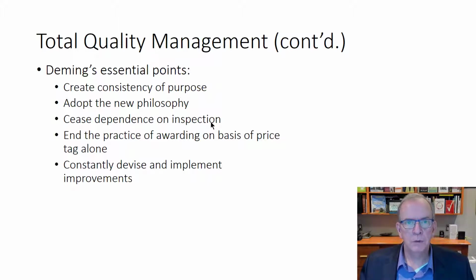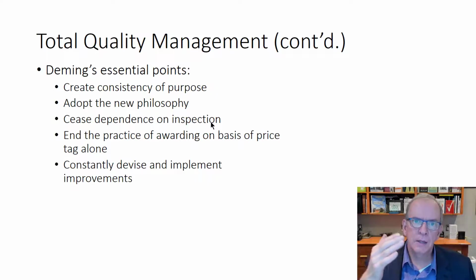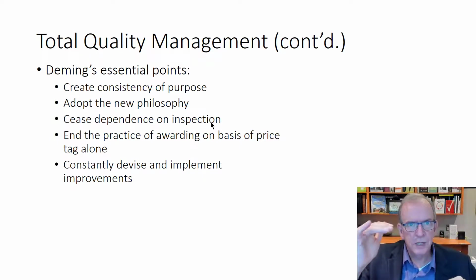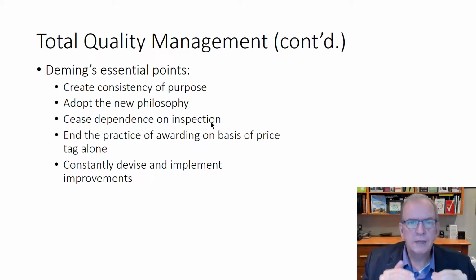Where possible, you have the gives and gets, which means the taper really needs to know what they need to provide to the painter to satisfy that expectation. So in that sort of relationship, the painter is the customer and the taper is the supplier. If we think of that, that's what lean construction does. It thinks about people, not just the client, as being the customer, whoever I'm giving something to in the process as being the customer.